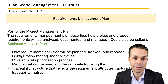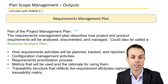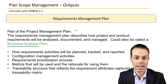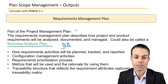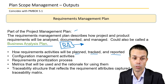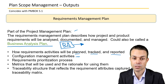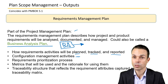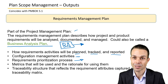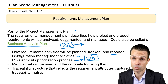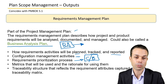The second output is the requirements management plan, which is part of the project management plan. It describes how project and product requirements will be analyzed, documented, and managed. It may also be called the business analysis plan given the rise of the BA role. It covers how requirements activities will be planned, tracked, and reported; configuration management activities including what parts of scope will be baselined and how changes are made; and requirements prioritization processes.